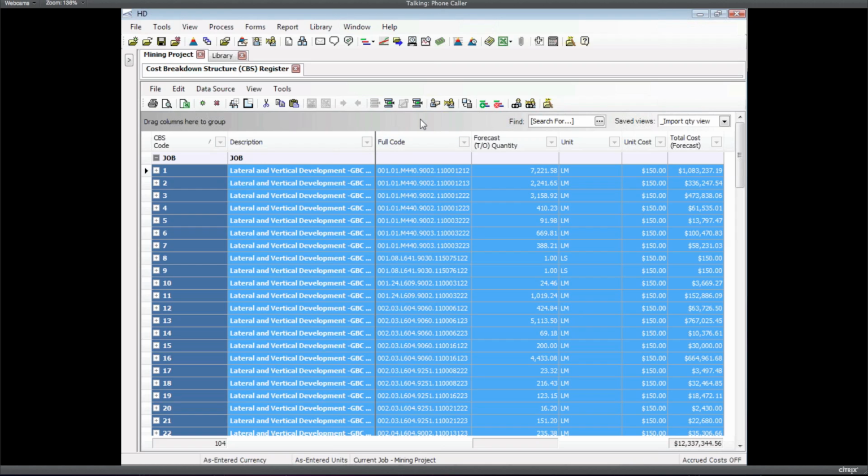Okay, this is where this period quantity enhancement really kicks in, though, because previously, if you wanted to look at this over time, remember this first item that was 2012 through 2016, 5 or 6 different periods. Previously, we would have had to break that into 5 subordinate items and schedule each one of those in order to spread that cost over time. Now I can skip the scheduling process altogether because my period quantities have already defined the timing. Right, so I can go right into cash flow at this point.